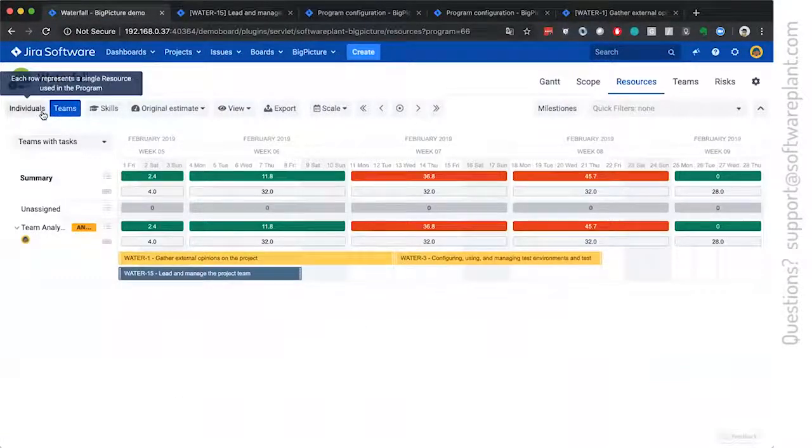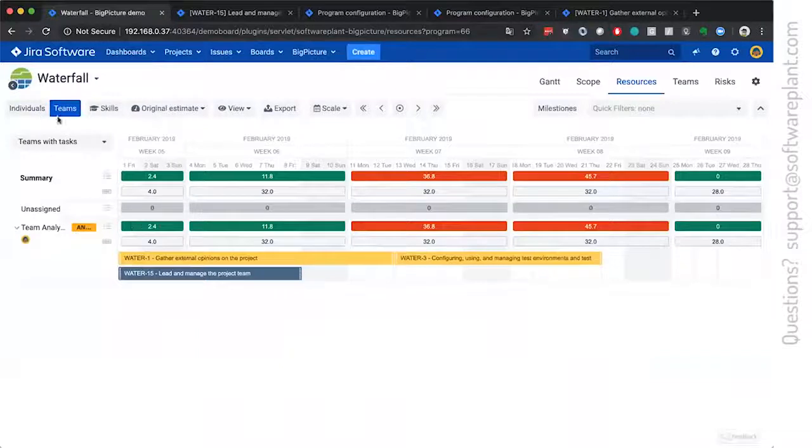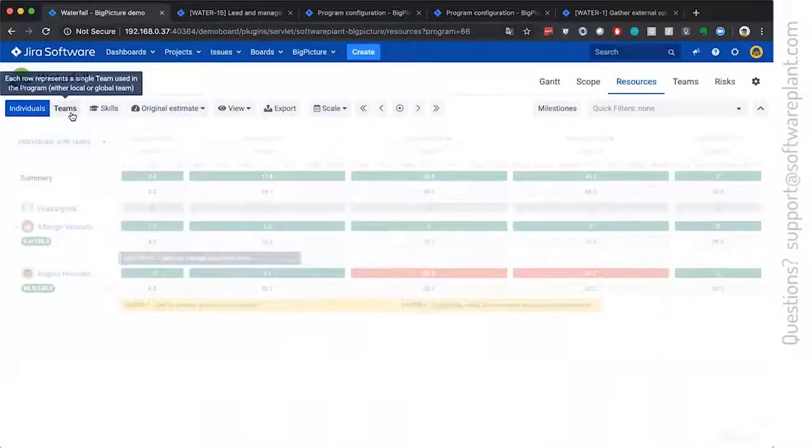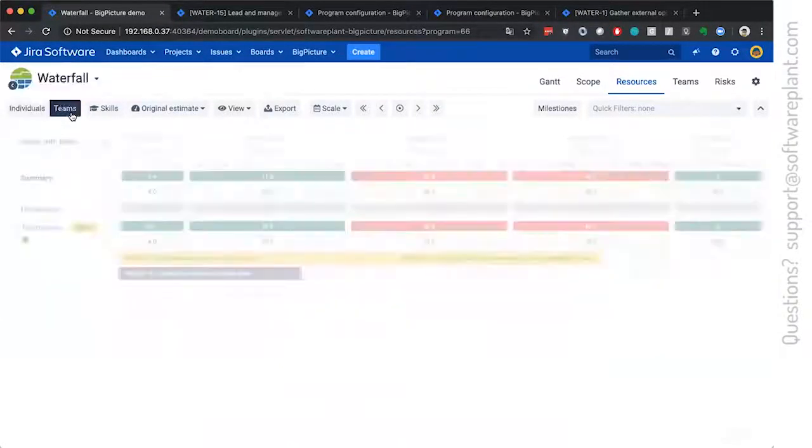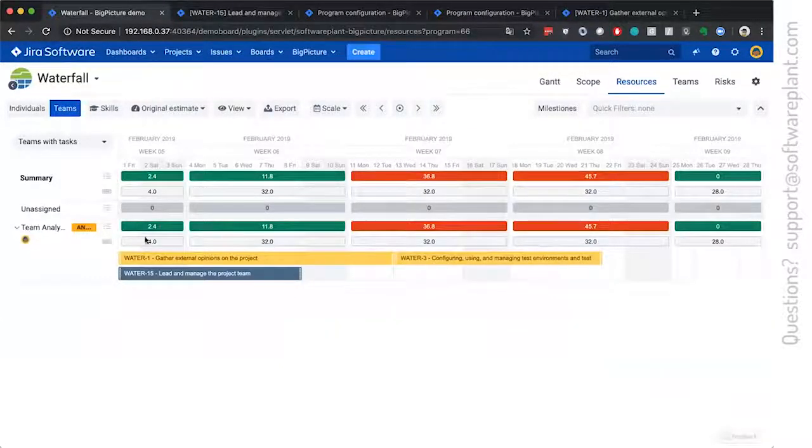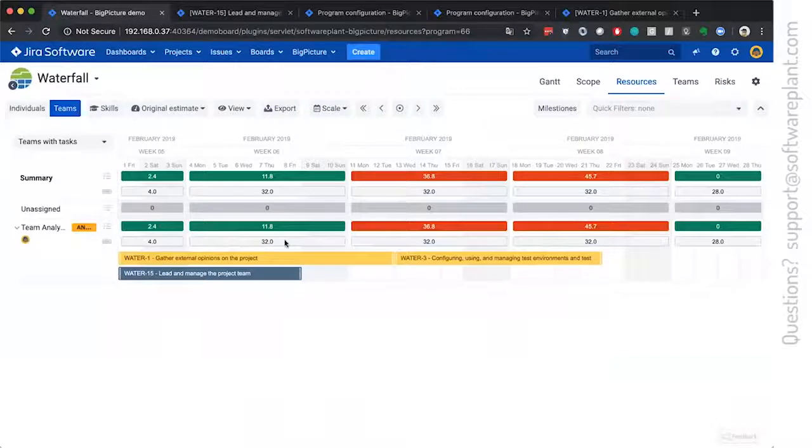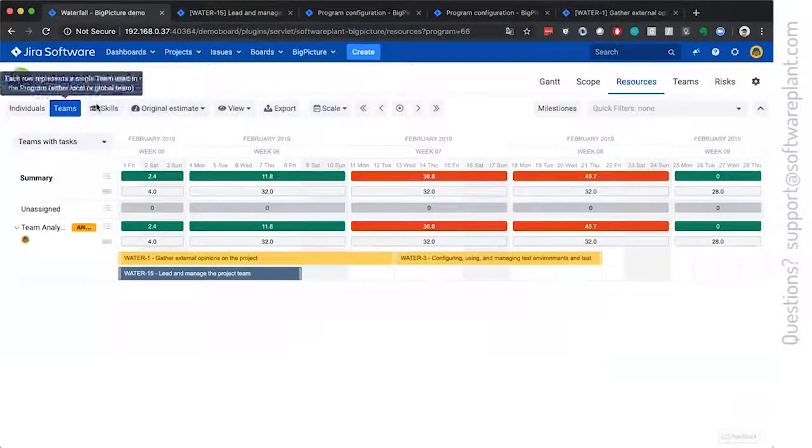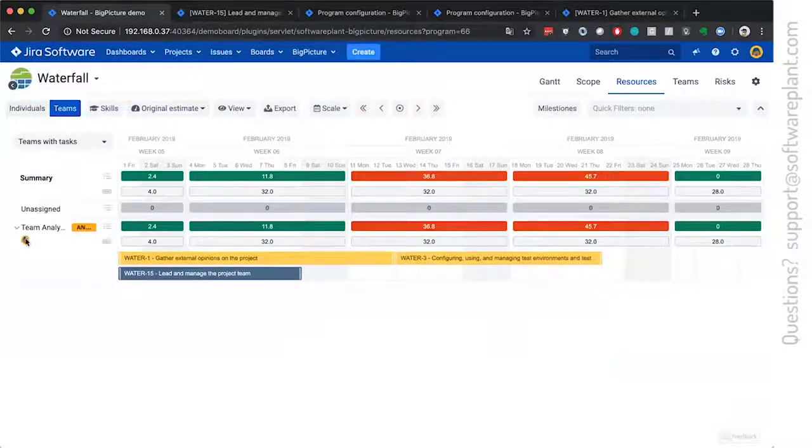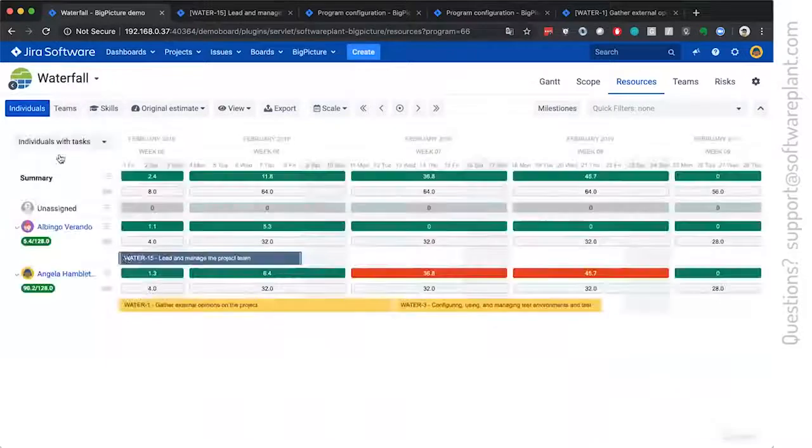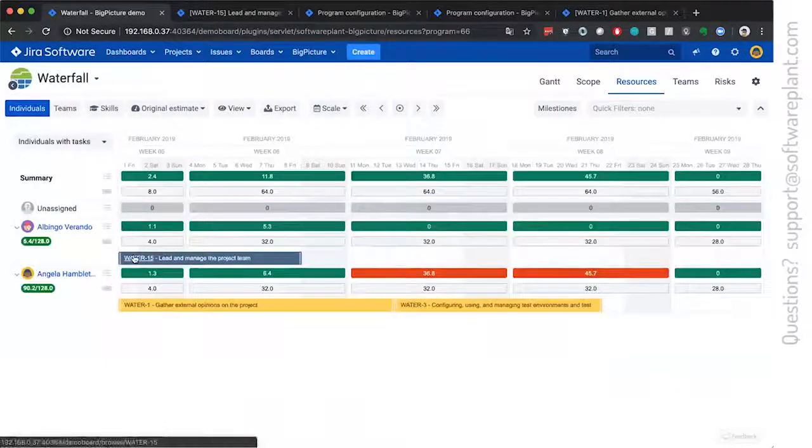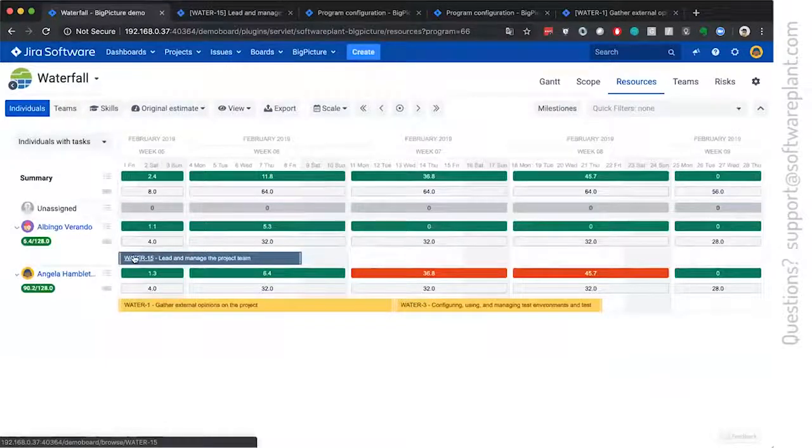And the difference between the individuals and the teams is that here rows are teams. And the team has a capacity, which is combined capacity of all of the members. Individuals, they all speak on their own.